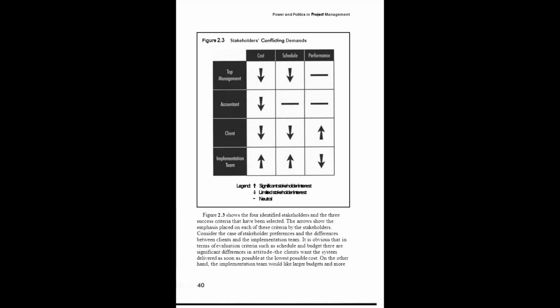Clients want the opportunity to alter the system, customize it, or add as many technical capabilities as possible. The implementation team is more comfortable with a simple system that has few technical surprises, is less likely to have long debugging procedures, and is not changed once it has been acquired. So this figure 2.3 represents a compelling portrait of the underlying conflict of most project implementation efforts.